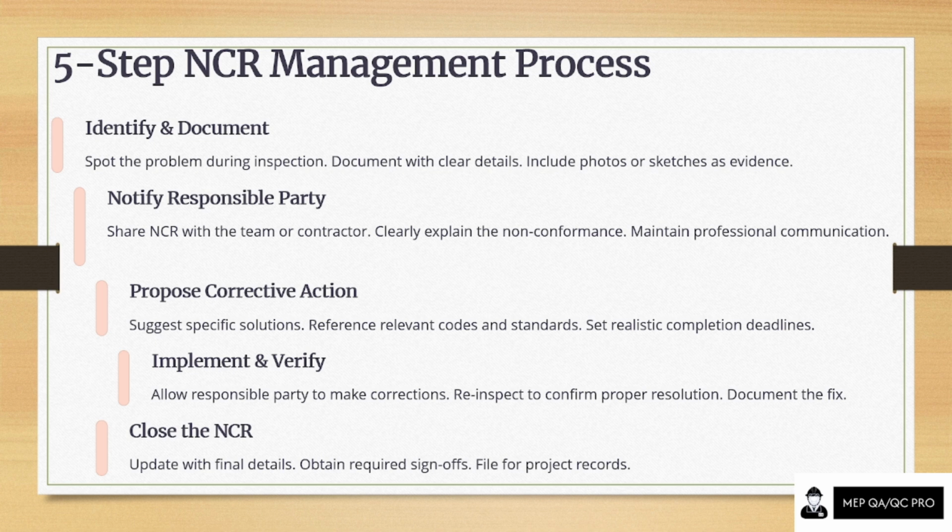This is how the management of NCR will flow. First thing, you will need to identify the problems. Second, you have to send it to your engineer, your contractor, whoever is there. Then, whatever corrective action they have taken, you need to be with them in order to see the corrective actions, along with the preventive action so that it will not reoccur in the future.